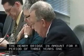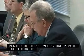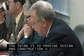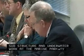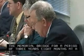The third is with HNTB Corporation to provide design and construction support services for Project MP06, substructure and underwater work at the Marine Parkway Gil Hodges Memorial Bridge for a period of 3 years, 8 months at a cost of $2,034,545.